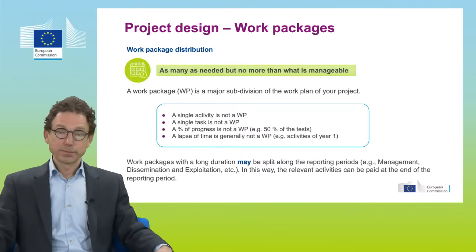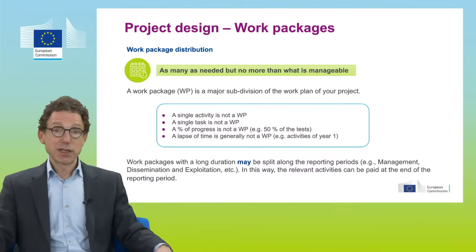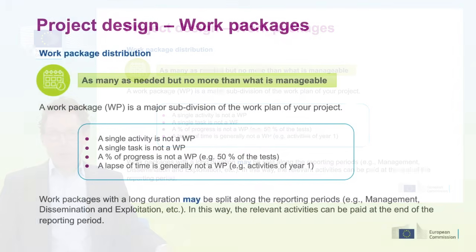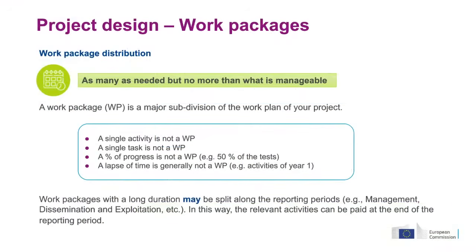One other specificity is the work packages. In the lump sum system, as we again see a bit later, we are going to pay you when work packages are completed. That means if you have long-lasting work packages, you can only be paid for these work packages at the end of the next reporting period after that work package has been completed. And that could theoretically create some cash flow problems for the project.